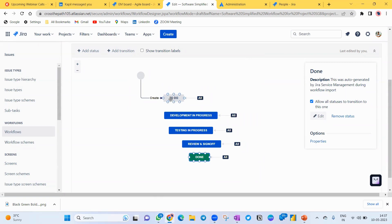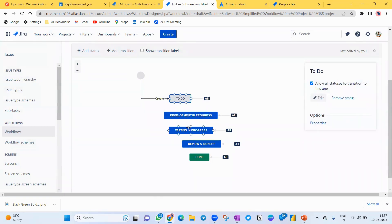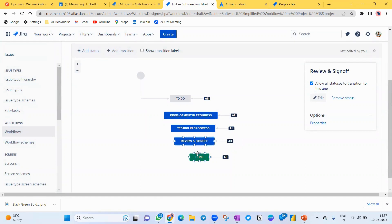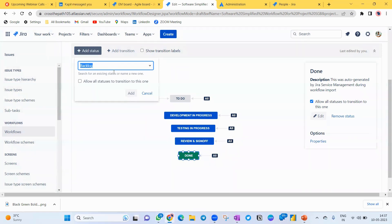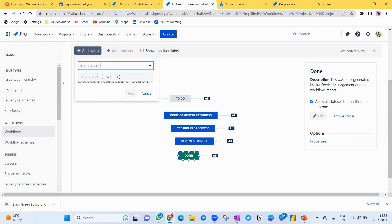So the workflow I need is: To Do, Development In Progress, Testing In Progress, Review and Sign-Off, and Done — five columns. Let me add one more stage: a Blocked or Impediment column. As Scrum Masters, we are impediment removers. If you create a dedicated Impediment column, you can move the blocked Jira task there so it's clearly visible, and the impediment must be resolved first before the work continues.